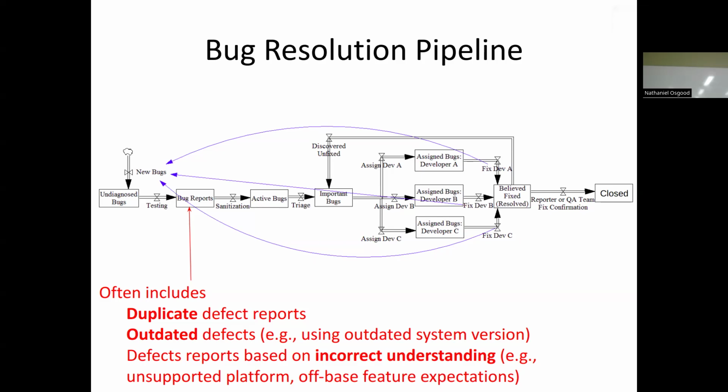This is a key point, right? Imagine you're 6 hours before going live, you have this defect, you know about it, you can either document it really well and give a workaround to the stakeholder, or you can try fixing it. It's kind of a Hail Mary pass sort of thing. You're counting on this working, but you don't have time, and that's really risky. So a lot of these active bugs, you don't actually immediately fix.